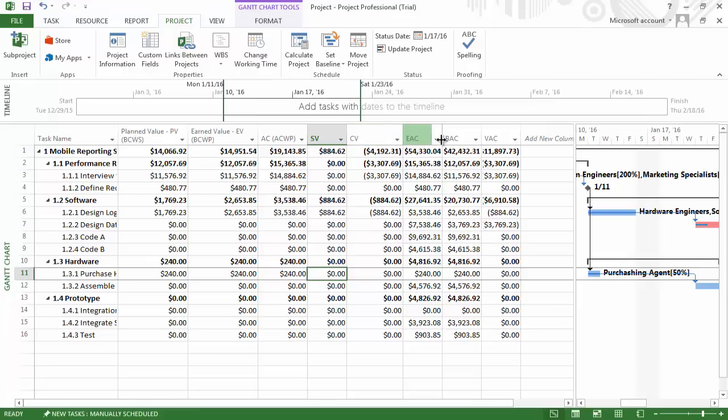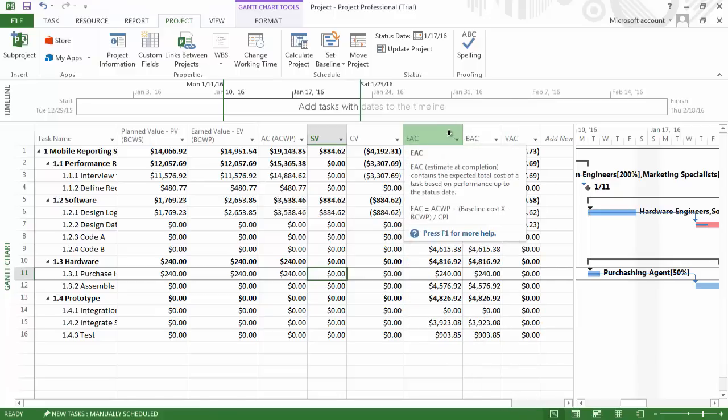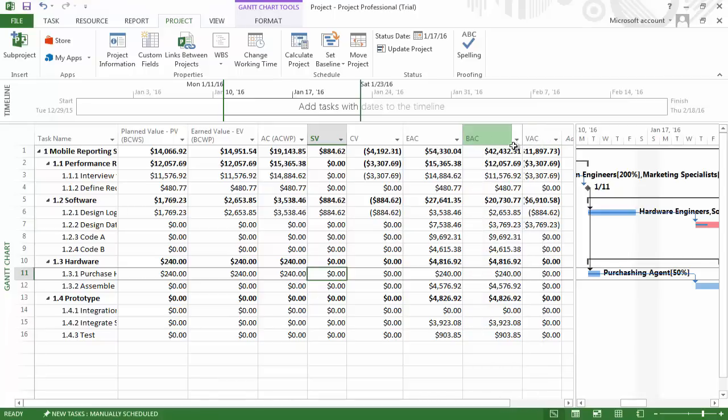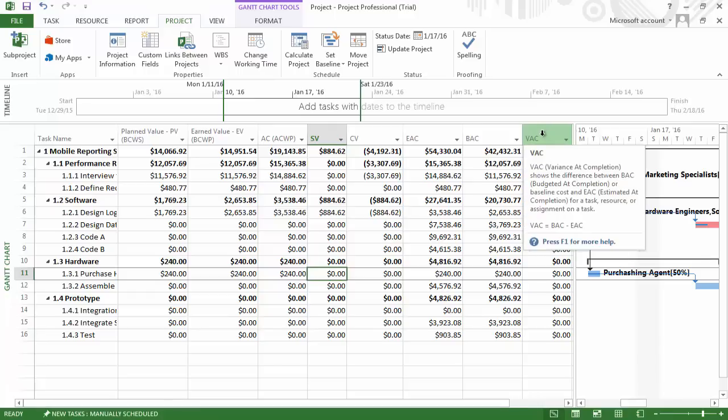The estimated cost of completion tells us, assuming that the CPI or cost efficiency stays relatively consistent throughout the rest of the project, the cost of completion will be around $54,000. Here, our planned cost of completion is a little over $42,000 and the variance cost of completion is the difference between the two. A negative variance cost of completion indicates that the project will be completed over budget, in this case by almost $12,000.